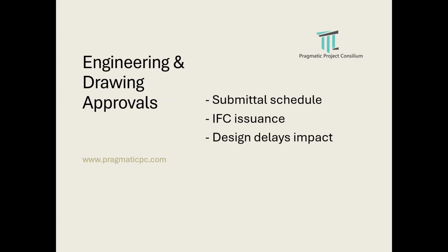Engineering and drawing approvals. This is a very huge document because the deliverables will be very huge. One thing I see that people have to adopt is to write the priority of the documents. Just because we have 1,000+ documents, it's not necessary to list all 1,000 documents. Because a general arrangement drawing always has a higher priority than a painting procedure. So you can't level both the same.